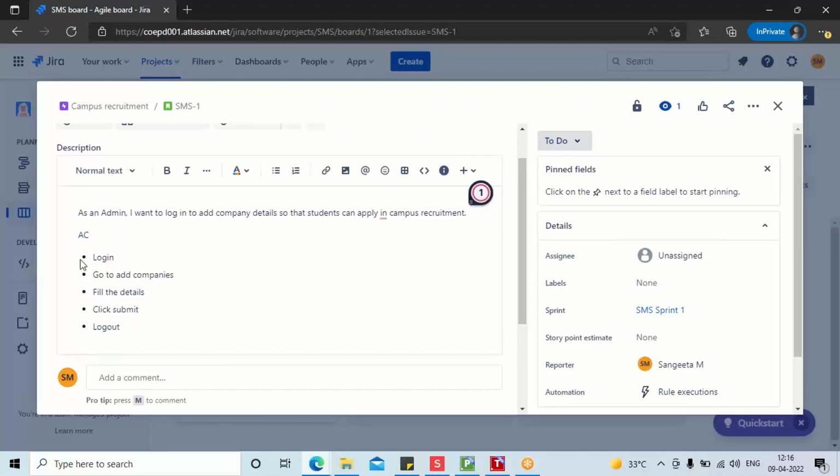So all of these options will be activated by a developer. Once the developer has created the code for the login page, the company screen and everything, he will assign it to a tester. Tester will do the testing, and after that assign it to a BA for UAT testing. You agree? So accordingly, the user stories will be assigned to multiple individuals depending on the status of it.